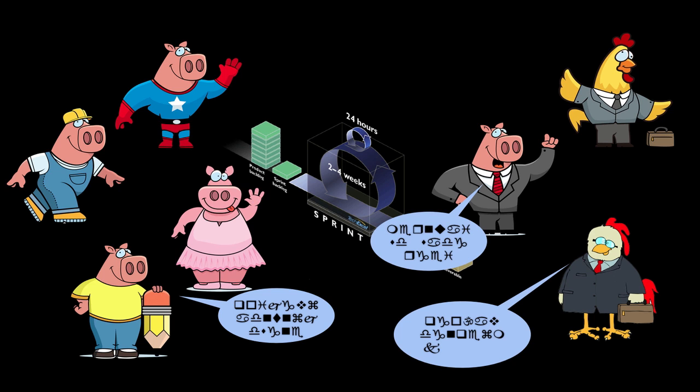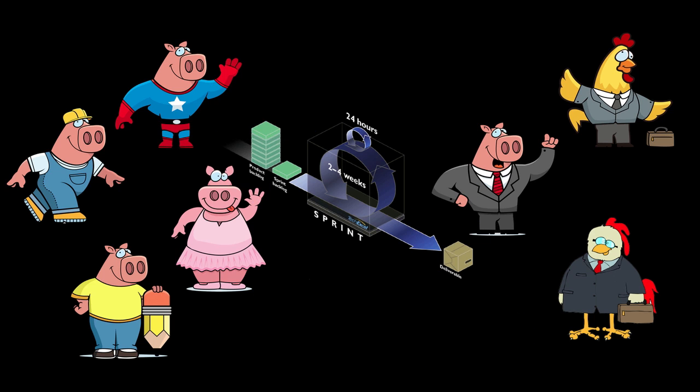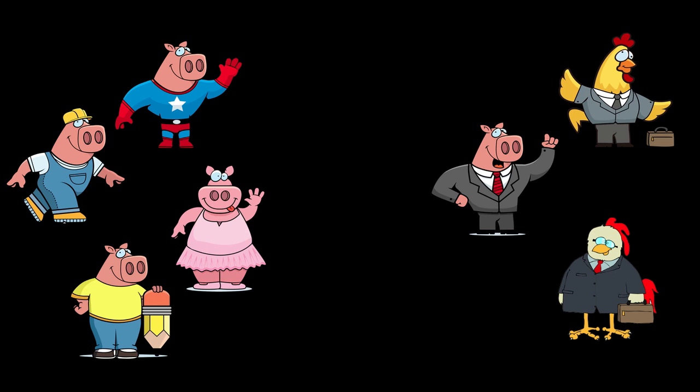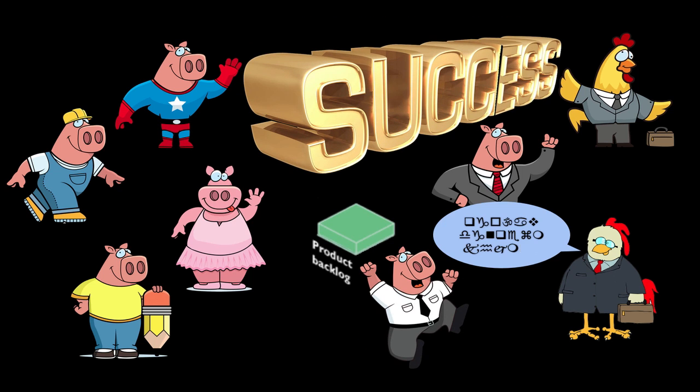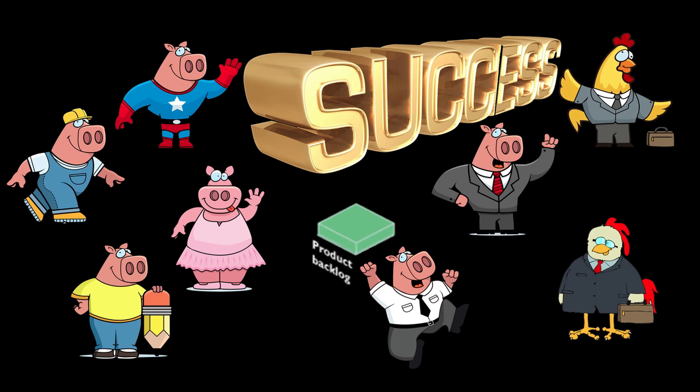Sprints are repeated and reviewed until the product backlog is empty or the product owner decides that enough business value has been delivered to declare the project a success. It is not at all uncommon for the product owner to declare success with 20-30% of the initial backlog items still remaining. This is usually based on feedback from the end users who see the immediate benefit of the product in its current state. The leftover 20-30% of the initial backlog items can be skipped, saving time and resources. These are items that a traditional development process would have included, but which through an iterative and adaptive process, the business owners and end users realized were not as valuable as initially thought.